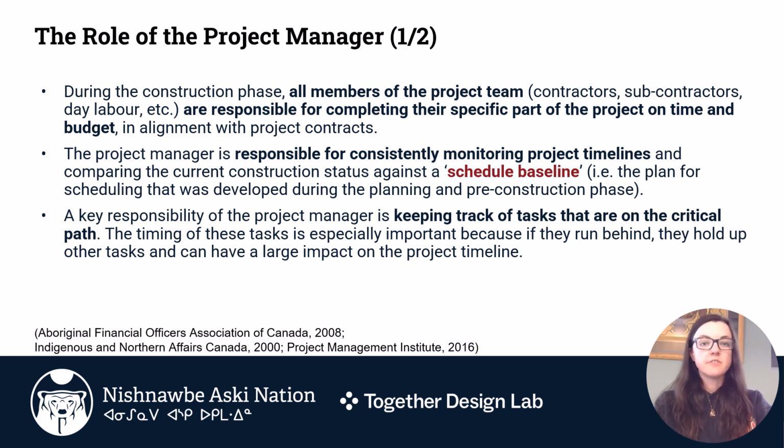During the construction phase, all members of the project team, including contractors, subcontractors, and day laborers, are responsible for completing their specific part of the project on time and on budget. The project manager is responsible for consistently monitoring project timelines and comparing the current construction status against a schedule baseline, meaning the plan for scheduling that was developed during the planning and pre-construction phase.